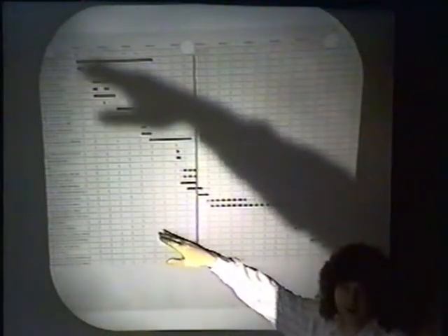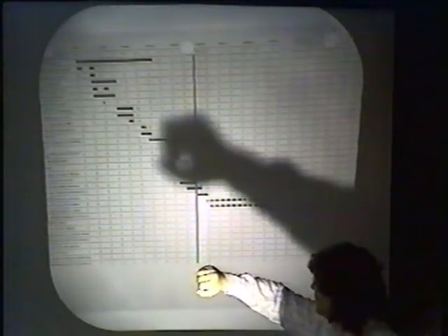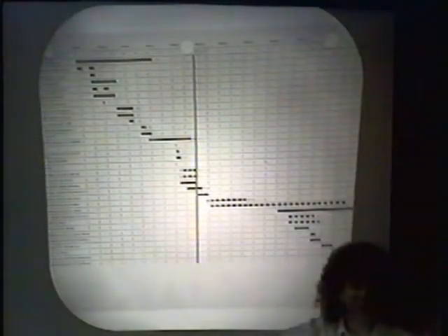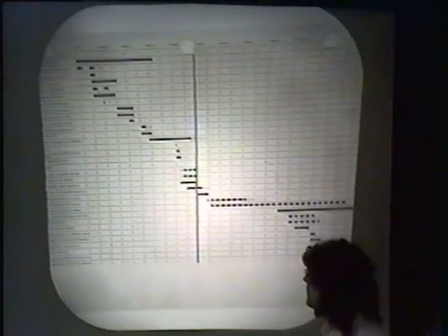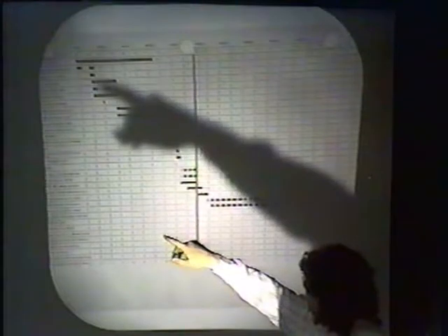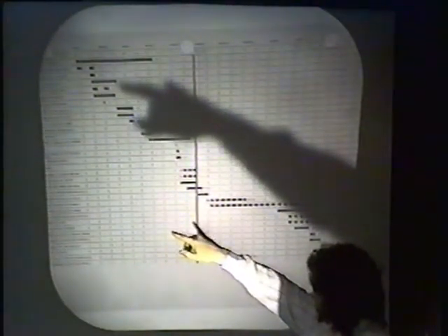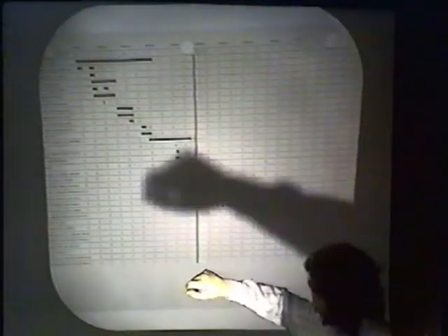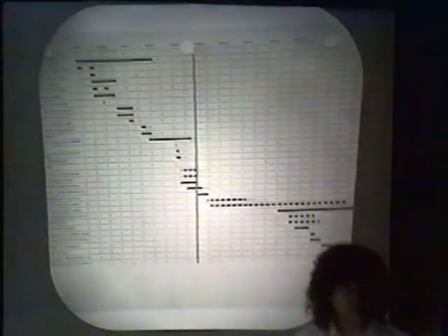Migration team members: putting together the team, breaking into your subgroups and identifying who's involved in what in this migration process. You may or may not make these rigid responsibilities, just areas of knowledge more than anything. Don't try to pin it to them as a job. That will vary from site to site. Gathering your site information, we're doing this about 4 or 5 months before the installation.